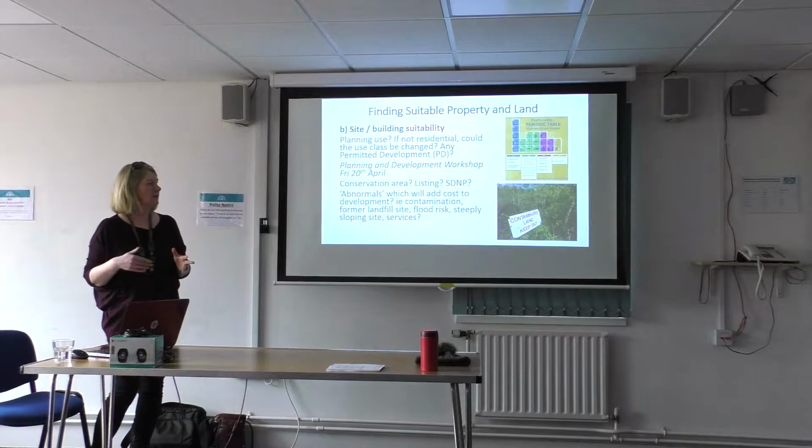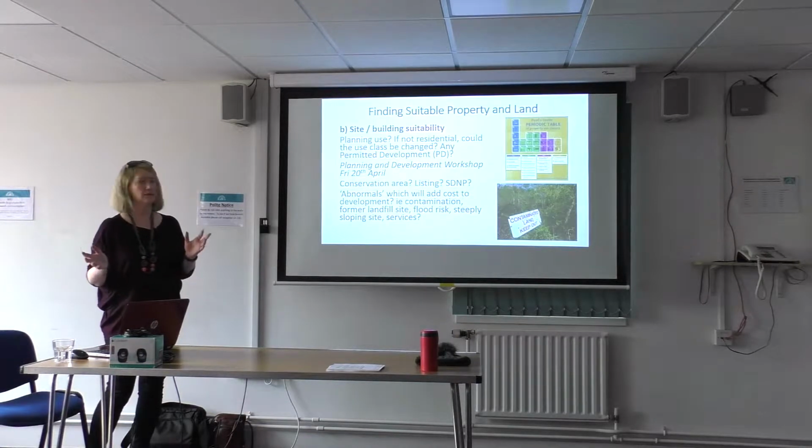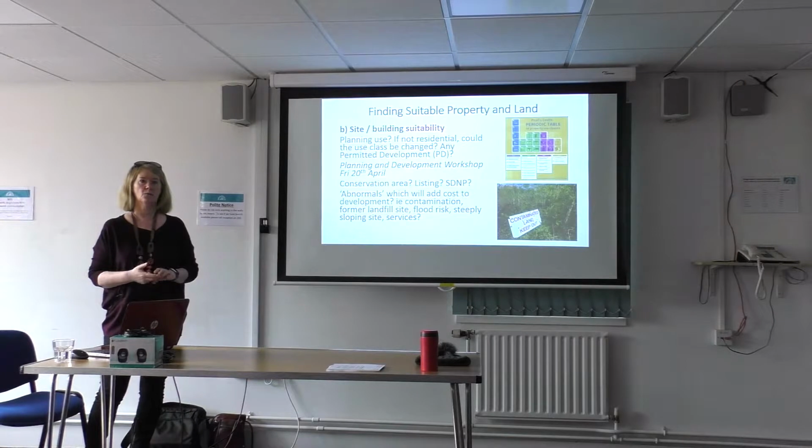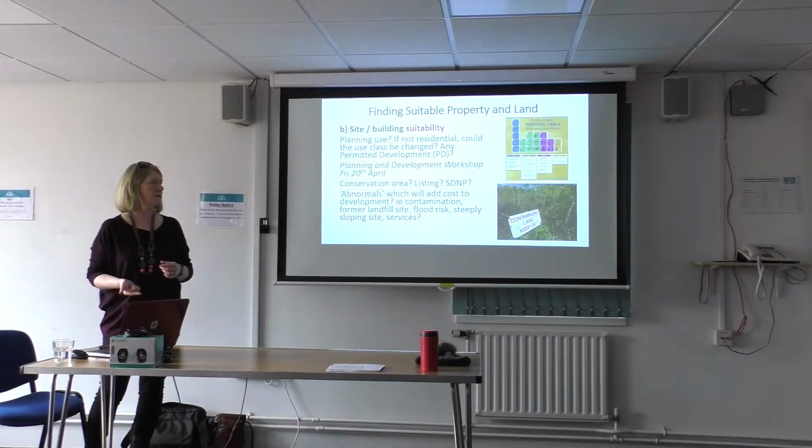The other thing to just take note of when you're doing suitability studies is: is the building or land in a conservation area, or has it got a listing? And what I mean is a heritage listing. So it's grade 1 listed, grade 2 listed. There's quite a lot of buildings and areas in Brighton and Hove that are either in conservation areas or are listed, or in the South Downs National Park. So there's quite a lot of restrictions that are placed on those buildings or land. I think it's something like 25% or 22% of Brighton and Hove is in a conservation area.